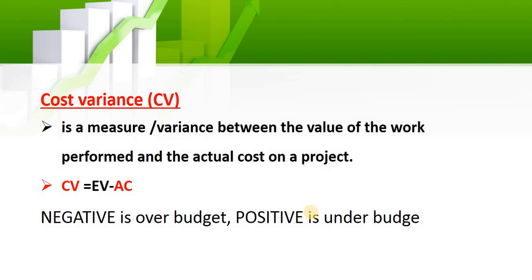Cost variance measures the variance between what you have earned versus the actual cost. If it is negative, you are over budget. If it is positive, you are under budget. So SCV measures earned versus planned, and CV measures earned versus actual.